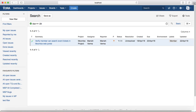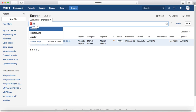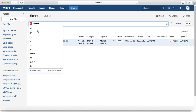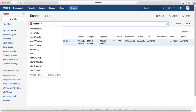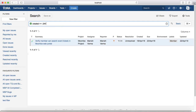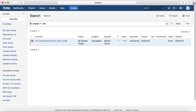Second query: you want to see issues created within the last 24 hours. That's in the past as well, so you'll use a negative number. The query will be created greater than or equal to -24h, and it will list the issues that have been created in the past 24 hours.